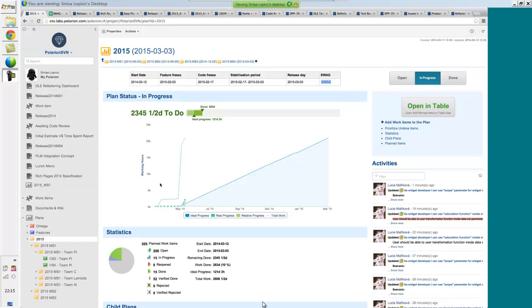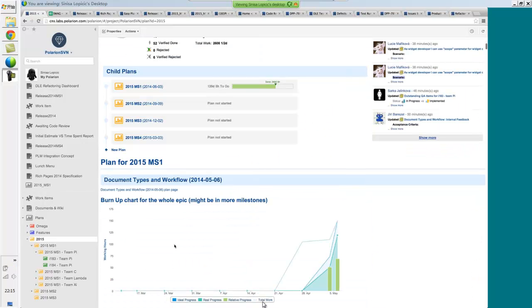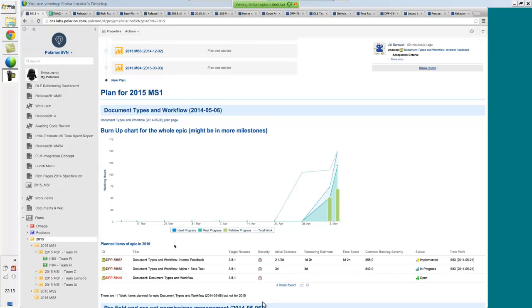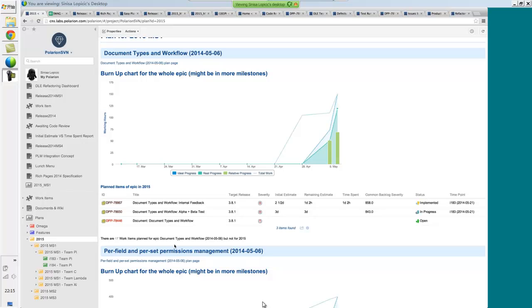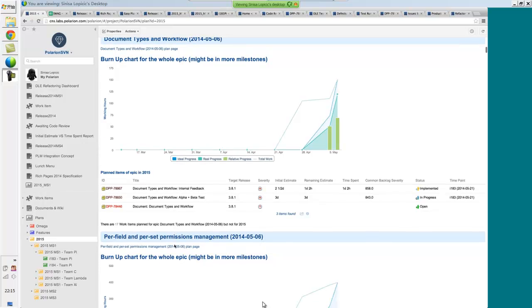So what we're actually doing from this document is we try to transition all of this information into the plan. As we're moving from one milestone to another, our plan should start mimicking the SWAG. Obviously, the plan is rarely the same as what we actually deliver, because of Murphy's law and everything else that happens in a process and changes the priorities. But it helps us track and understand at any point in time how we're progressing through the year. Okay, so that's basically SWAG and why we use it.